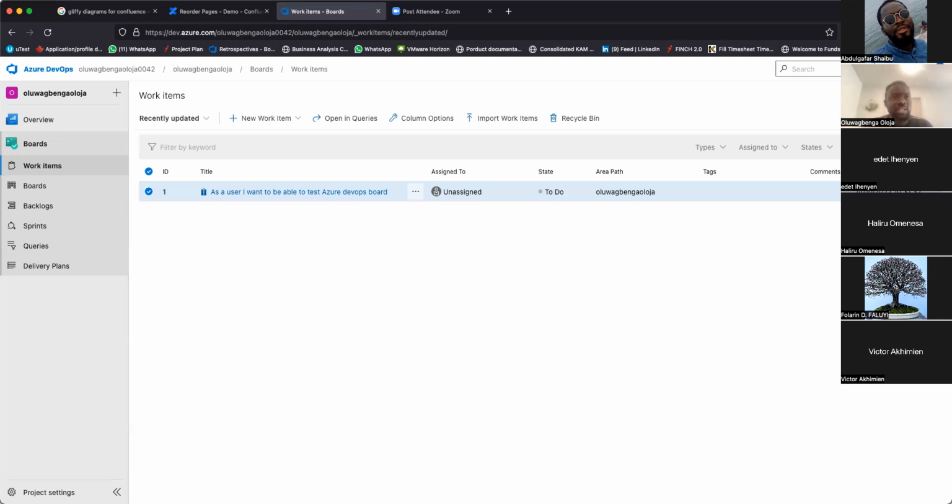What that helps you do also is now, because you've gone live in Nigeria, maybe there's an error, there's a bug that needs to be fixed. You can get that feedback from Nigerian users who can say, yes, we get our money in Naira. However, your rate is small or whatever, or every time we log in, there's an issue, there's an error message. We can quickly now say, okay, in the next sprint, we must fix this error first before we try to do the UK people and the US people. That is where prioritization comes in as well. You understand? So when you hear prioritization, this is basically it.